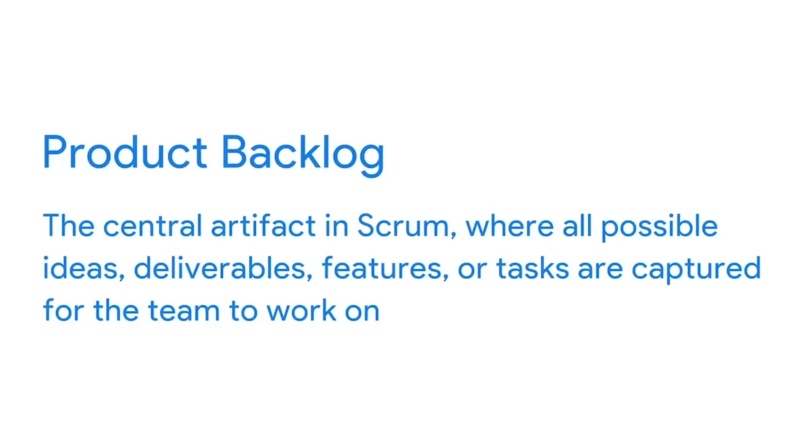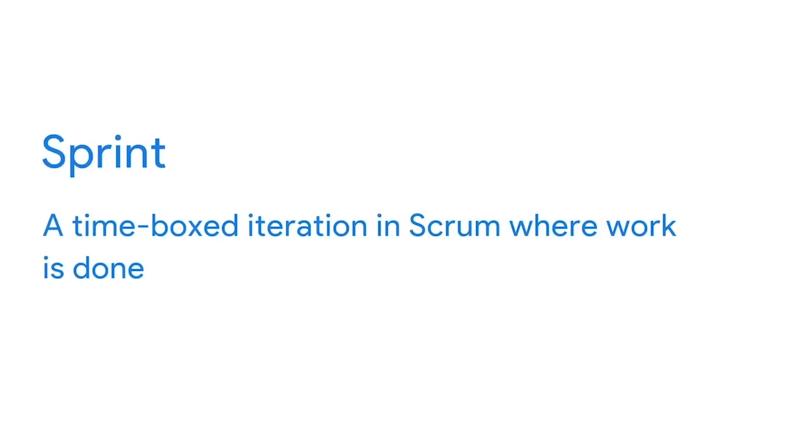Let's review some terms and concepts specific to Scrum. The backlog is the central artifact in Scrum, where all possible ideas, deliverables, features, or tasks are captured for the team to work on. It's prioritized and proactively managed by the team continuously throughout the life of the project. The sprint is the name of the time-boxed period in Scrum where work is done. The sprint can be between one and four weeks long, but most sprints are around two weeks. This is often called the iteration.